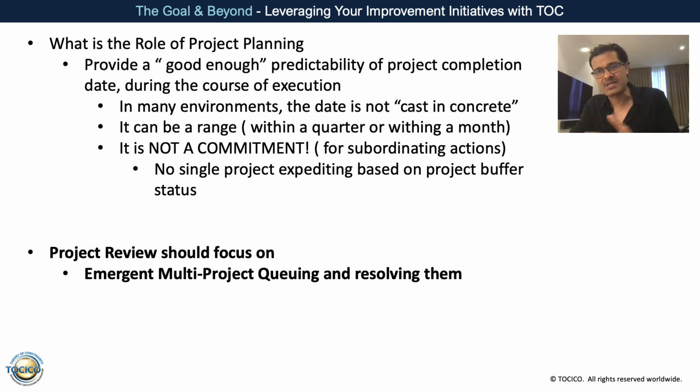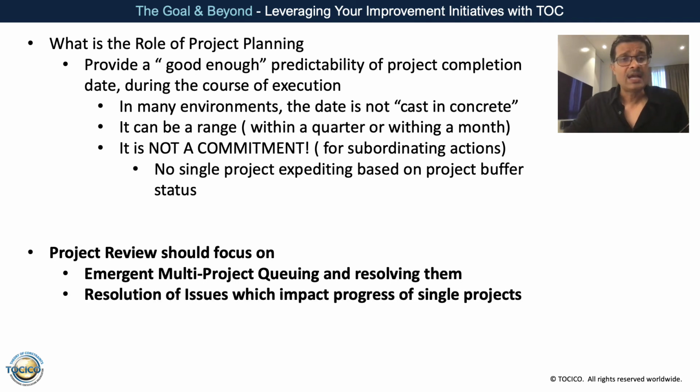Where are my traffic jams? Like when you open up Google Maps, you've got to see where those red points are where jamming is happening, and you resolve those jams. You help all the projects, right? So that's the first view, which is a project agnostic view, and you take a pipeline view. The second view that you take for the project is about issue resolution. What is the current issue that is holding the progress of the project? You focus on resolving that.